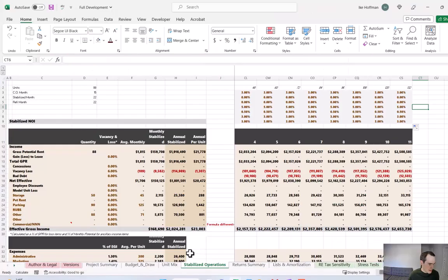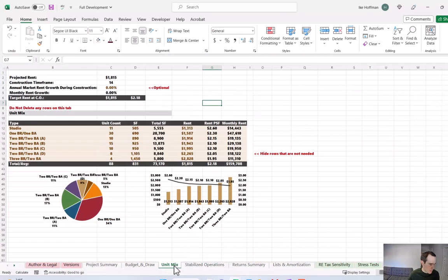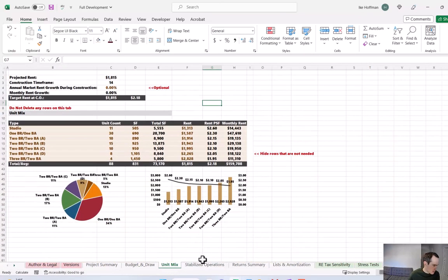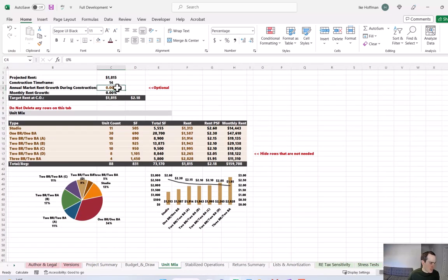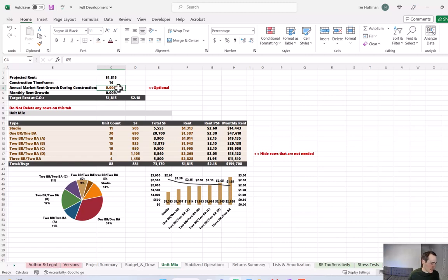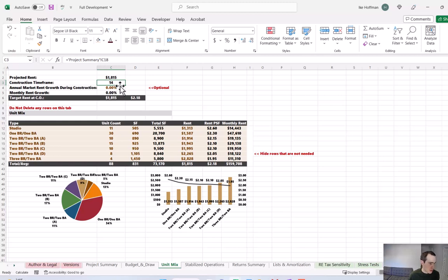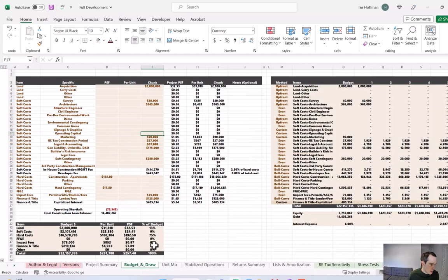So now let's take a walk back through the tabs and just make sure everything is populated and working properly. The unit mix tab, there's nothing to do here. If you did want to make an assumption of rent growth during the construction period, you can do so here. However, I think it's really risky to do that. This has a big impact on return. So if you grew rents at 2% or 3% during the 14 months that this property is under construction, it's going to really boost your equity multiples and IRRs. I want to keep it conservative, so I'm leaving that at 0%. All right, in the budget and draw tab,